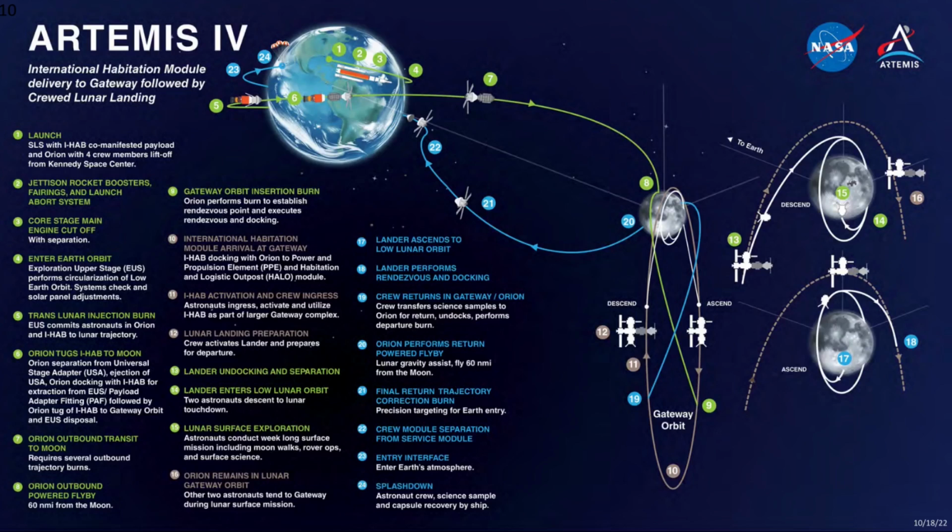Artemis IV adds dependencies for the readiness of additional elements on top of the Artemis III vehicles, including the initial Gateway capability, Mobile Launcher 2, Exploration Upper Stage and SLS Block 1B, and also the Gateway Logistics Spacecraft and Habitation Module. There were notable signs of progress in the last quarter, but the new capabilities in development or production have much farther to go, given the target date for Artemis IV is still 4 years away.